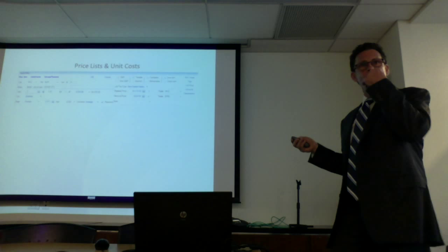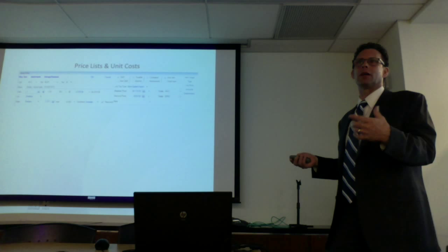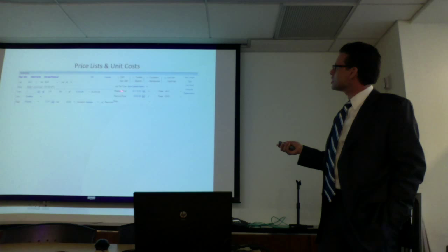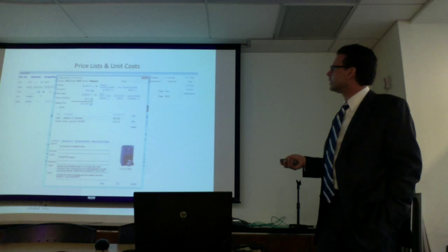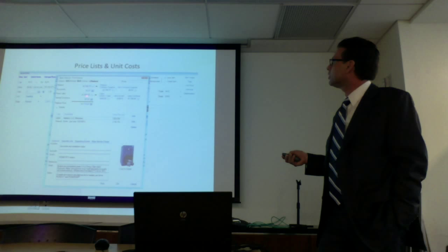Now, when I speak to Xactimate, they tell me when you change a price, don't change it in replace, because there's two components that make up replace, labor and materials. They want you to go in and change it more appropriately to what the actual increases. So when I go in and I hit replace and I want to alter the replace price, I hit information and it opens up another screen. This tells me how much they have. So it has $2,186 for the material. It's got the labor of $1,924 and a total of $4,100, then all the other factors.